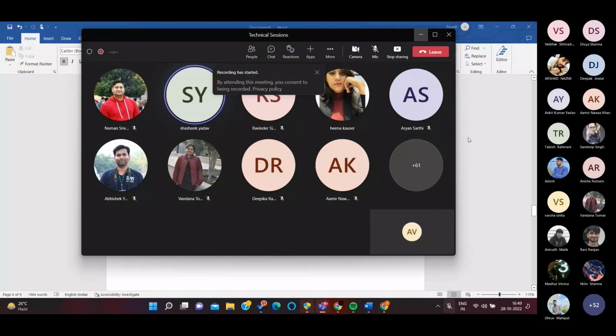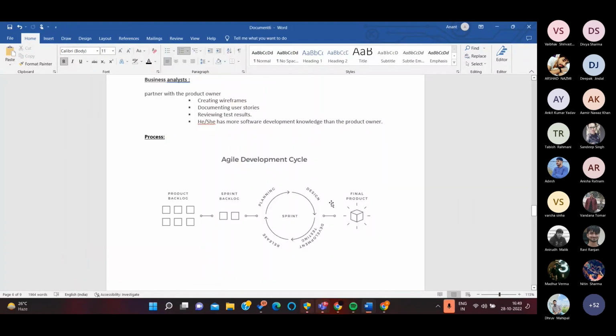Also, if your team size is very low, what Anant was trying to say is that it is overkill to have this whole agile process. If you have only two developers, you can directly check those things. Why have all these tools and everything? It is best suited if your team size is more than four or five, or you have multiple teams. That's understandable.